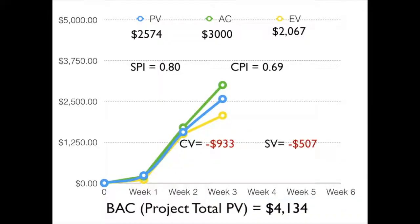Let's look at the example we've been using so far, where we have a planned value at this particular point in time, at the end of week 3, of $2,574. We have an actual cost of $3,000 and an earned value of $2,067. Our total planned value, or BAC, for the project is $4,134.